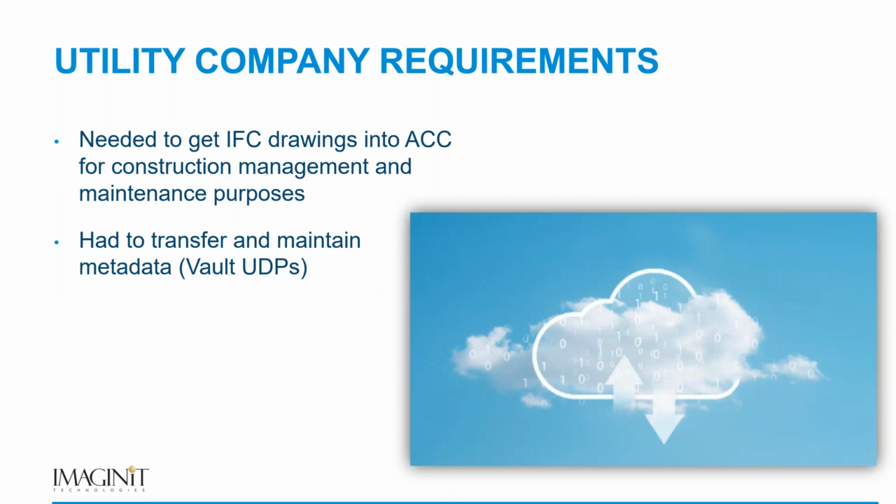And what the requirements were was pretty simple. They wanted to get their issued for construction drawings, once they were approved inside of Vault, transferred over to the Autodesk Construction Cloud for, number one, construction management purposes, as well as for maintenance purposes. So part of the problem they were trying to solve was having all the pertinent design information available during construction, but also have it available down the line for their maintenance teams.